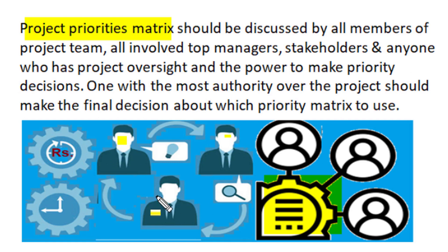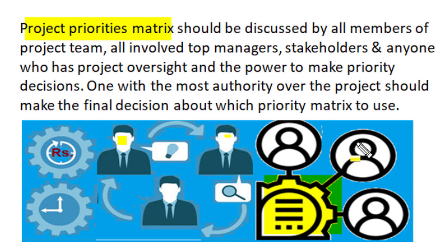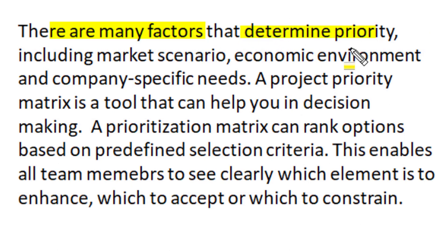Project priority metrics on budget cost, time schedule and performance scope should be discussed by all members of the project team. It must involve all top managers, other stakeholders and anyone with project oversight and power to make priority decisions. The person with the most authority over the project should make the final decision about which priority metrics to use — whether to enhance, accept or constrain the three project criteria.